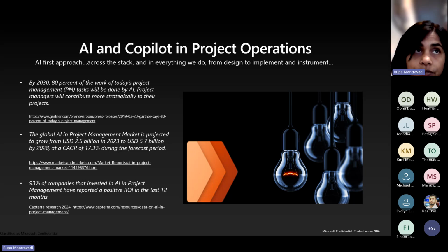It's not a yes to the first part. It's a yes to the second part. So our resource recommendations is leveraging URS availability constraints. So basically our resource recommendation takes 5 factors into consideration before it's recommending a resource. One is the cost of the resource compared to what you have budgeted. The second is the availability of the resource.